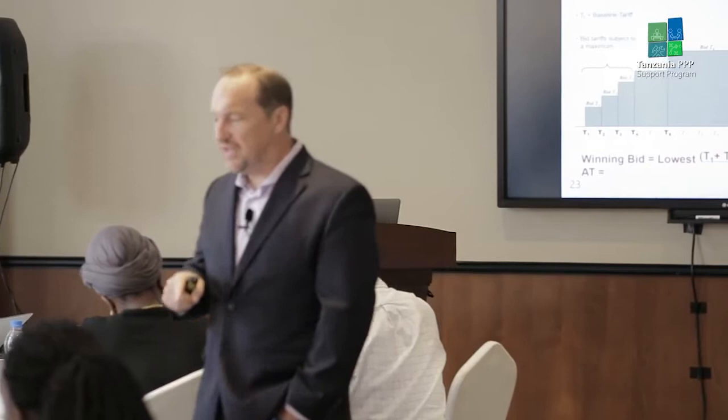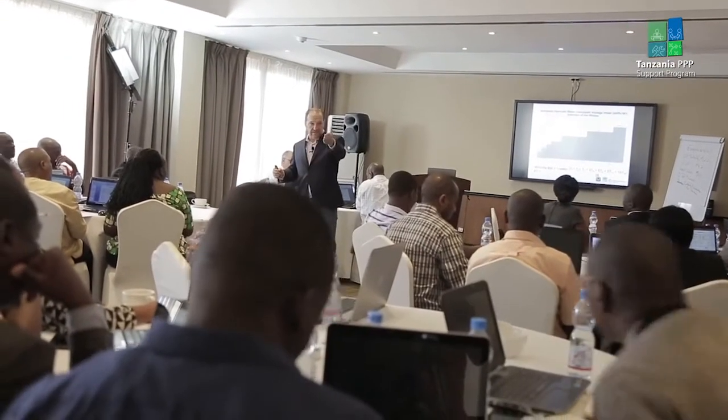Well, what was our award criteria for yesterday's VIS project? How did we award it? What was our award criteria for our procurement decision yesterday? Meeting performance standard at affordable price. All right. So it was everybody who met the performance standards, and then it was the lowest price. And to make it fair, we did it on a present value basis because it changed over time.